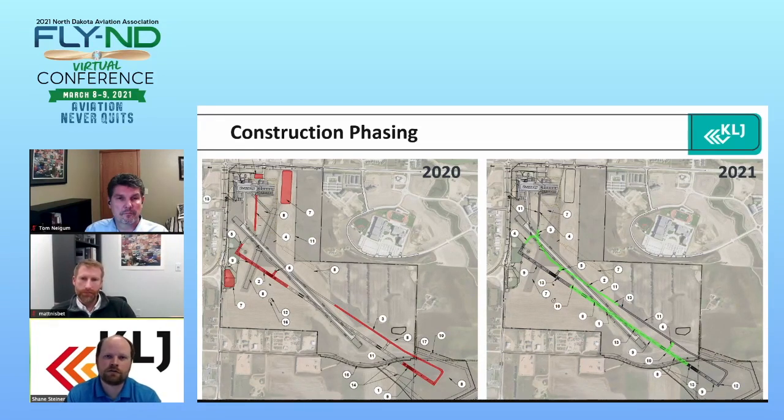And in talking to a few of the larger contractors that would be interested, they noted as such that it would be risk that they would have to build into the project. And the other, and probably the most significant thing, was the discovery of some culturally sensitive areas. Once we got into this thing, and once we got into those deep cut areas, what were we going to find?